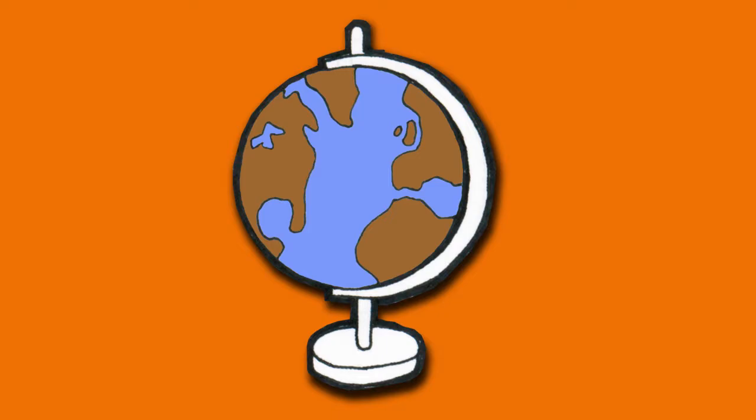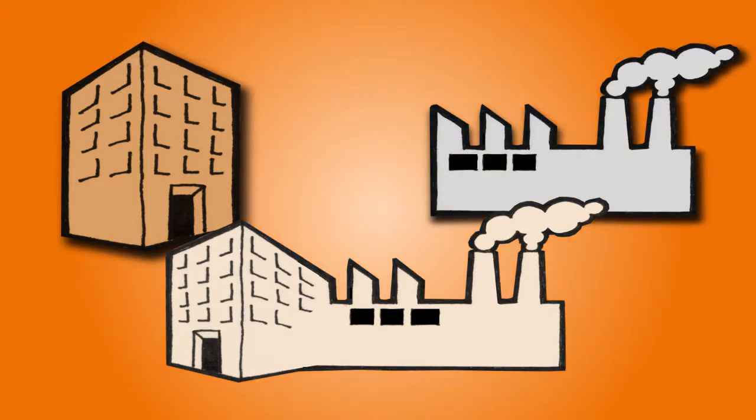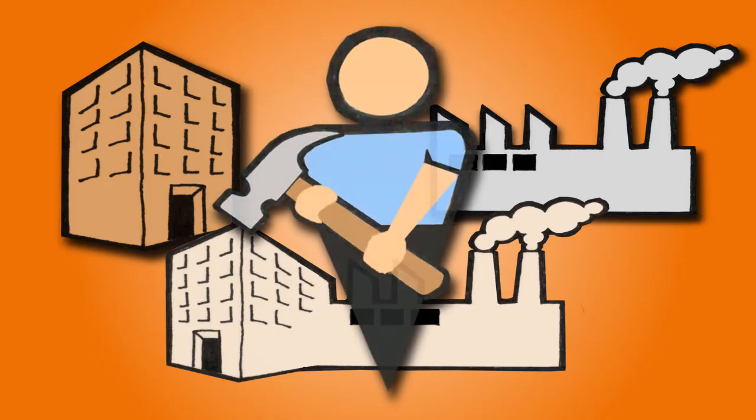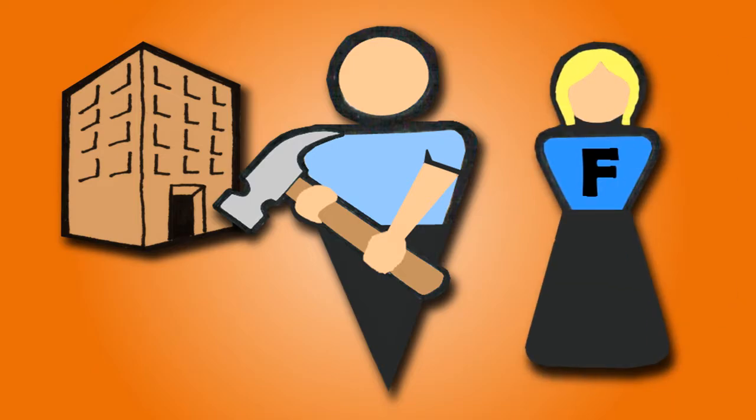One of the enterprise environmental factors that affects an organization is its organizational structure. Most companies are organized as either a functional, matrix, or projectized organization. The influence and authority a project manager has in each of these organizations can vary, from having little or no control to having absolute control and the complete responsibility of the success of a project. In a functional organization, the project manager may have to report to the functional manager. A functional manager is a person who runs a functional department. An example of a functional department is the HR department, the IT department, or the sales team.